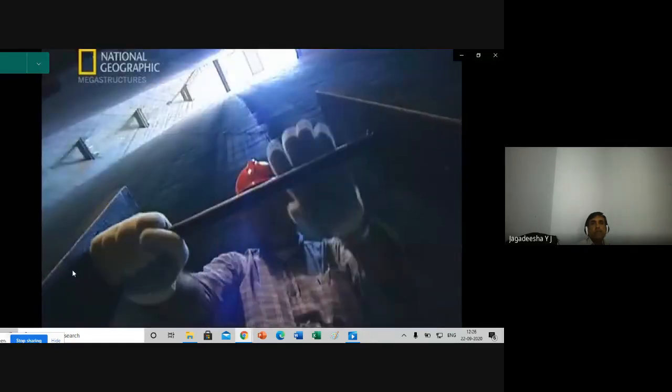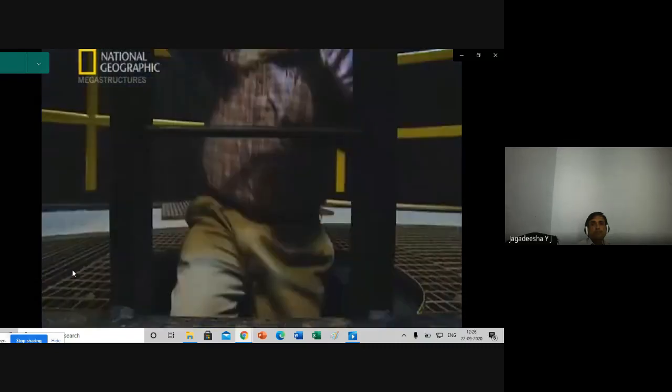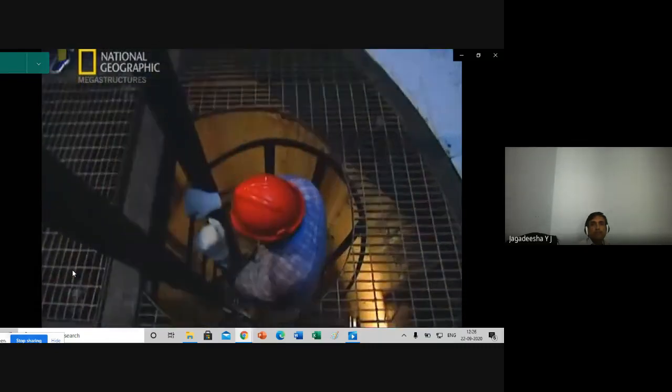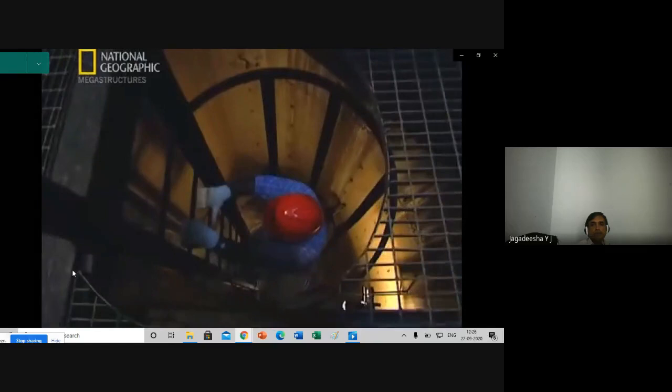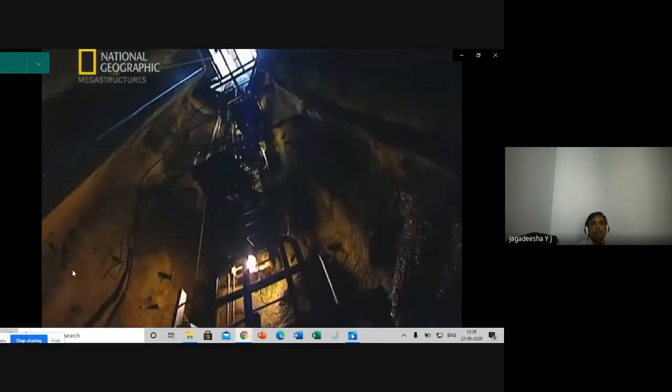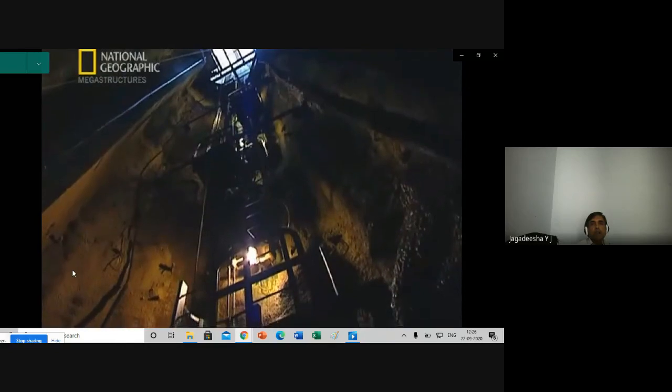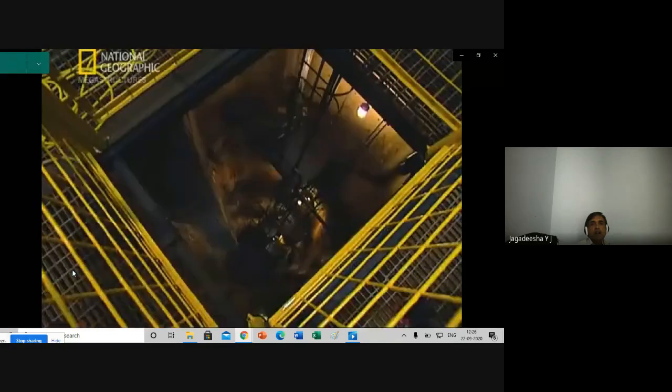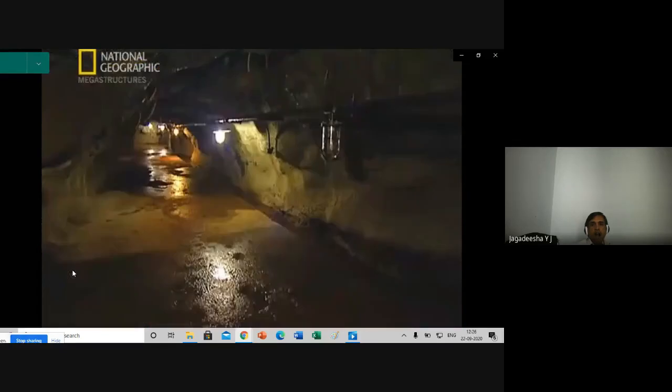It was disastrous news. The survey gave the bedrock a clean bill of health, but now engineers had come across a weak layer of crumbling rock, like a rotten tooth 20 meters down. The engineers feared that it wouldn't support the weight of the dam. If they carried on building, the dam would collapse.